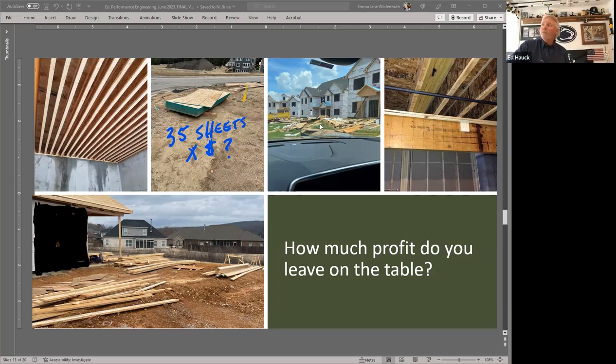Okay, the top right is really just bad engineering. Nobody ever really calculated that point load, never found out where it was. So that's the other side of it. I have to understand exactly from design to estimating to field, how much money I'm leaving on the table. And by the way, every one of these jobs that we were on, we found at least 5% in wasted and lost profit. Okay, 5% of your directs. That's a lot of money.